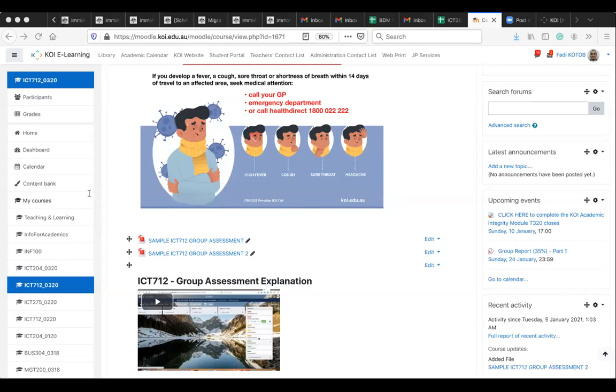Now, one is you need to know who are the users of your system. You need to clearly define the users of your system. That's step 1. Step 2, you need to ensure you're going to write user stories. In other words, what features we need that are relating to each user. So if it's a director, as a director, I want an account on a portal, right?